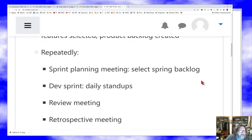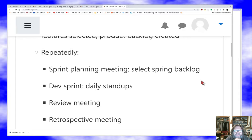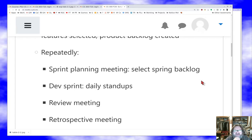Then we go through this process: we have a sprint planning meeting, we select the sprint backlog — that is, we select from the product backlog the tasks we're actually going to do this sprint — and then we do a sprint. There will typically be meetings at the start of each day called daily stand-ups, which are very brief, where everyone reports on what they're up to that day and how things went yesterday. Those sprints are all fixed length, what's called time-boxed. At the end of each sprint we have a review meeting and a retrospective meeting about process. The book doesn't mention retrospectives for some reason, which is a little weird. Then we come back around and start planning the next sprint.